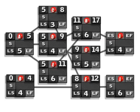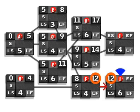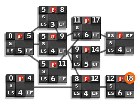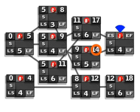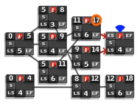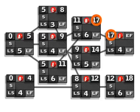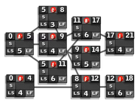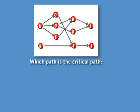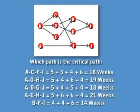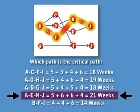Now we come to activity I — we know our early start is twelve. Twelve plus six is eighteen. For activity J, we have to choose between the early finish for activity G and activity H. H has the larger number, so we select seventeen as the early start for J. Seventeen plus four is twenty-one. When we looked at each path individually, the path we selected had a duration of twenty-one weeks for the critical path.